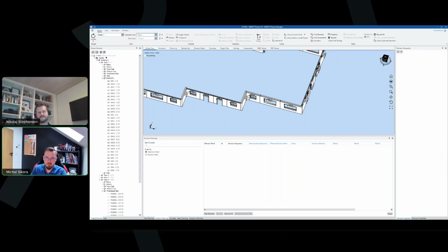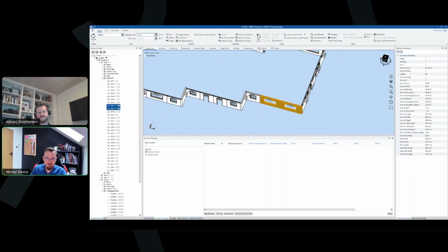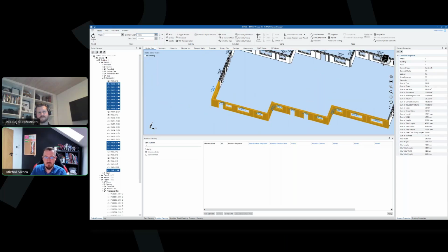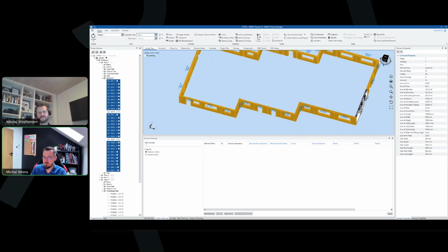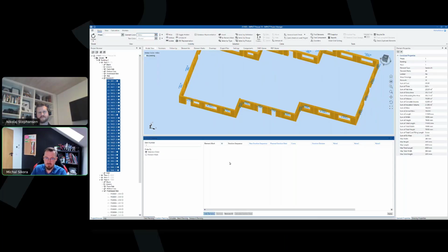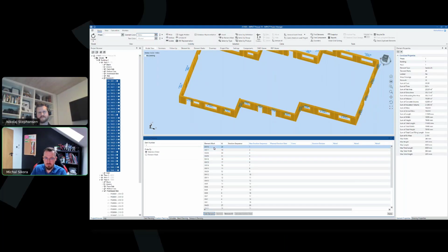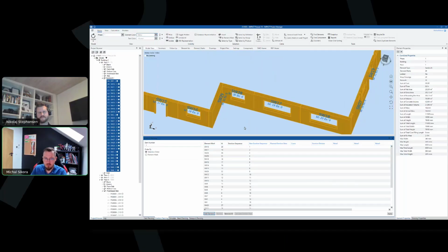I can select multiple elements, not with this option, but I can select my elements just by holding Control and just moving around the screen in a specific order. And the order of my clicks, so basically the order of selection of the elements defines the erection sequence of the elements. So you see me going clockwise on this particular floor. I'll add those elements after that selection, and SW18, so the one I started clicking off, ID 20, and new erection sequence will be 1.